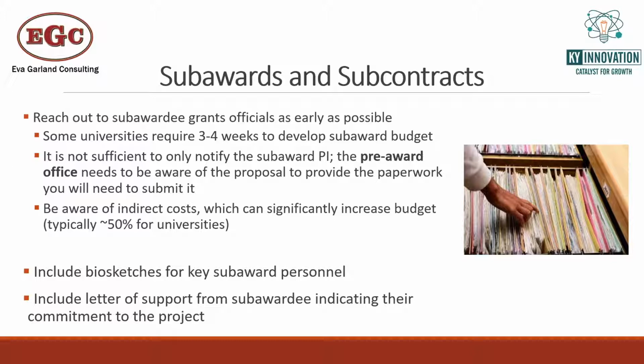Also, it's good to keep in mind that for grant awards that are not SBIR, STTR, so awards like R01s, DoD contracts, etc., generally when the investigators put together the budget, they're really only thinking about their directs, and the caps on the budgets are all based on direct costs. So you might have an R01 that has a cap of $500K a year. That's just the directs. And so the principal investigator never has to worry about indirects. And so this is really the first time that they're going to be in a situation where they're applying for a grant where indirects are included in the cap on the total budget. So it's a very different way of thinking from what many academics are used to in constructing their budgets.